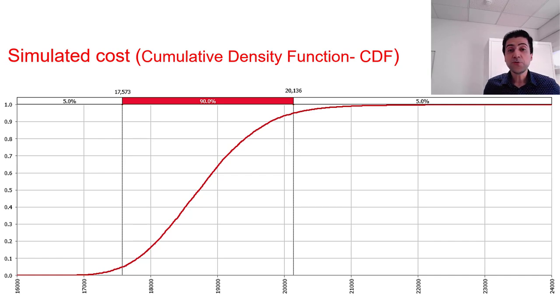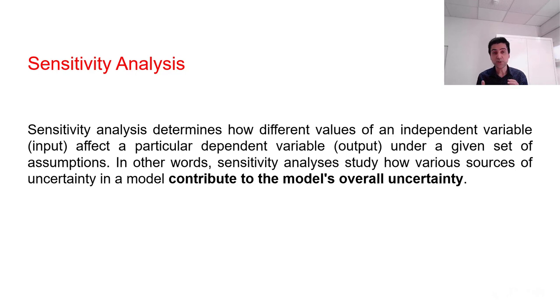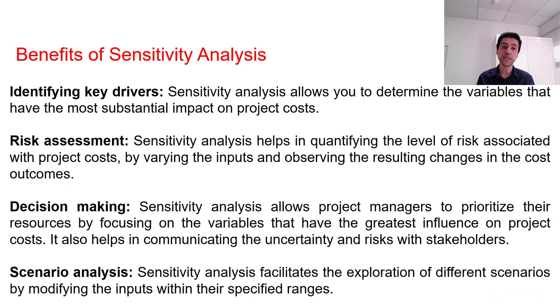We can continue going deeper with our analysis and having more interpretations and calculate the sensitivity of the output, which is the total cost in this case, to different input variables such as land, IT equipment, and others. There are different benefits that we can achieve by conducting sensitivity analysis. We can find the most impactful variables. We can quantify the level of risk associated with any input. It is a very powerful tool in the hands of decision makers. And also for scenario analysis, we can define different situations.